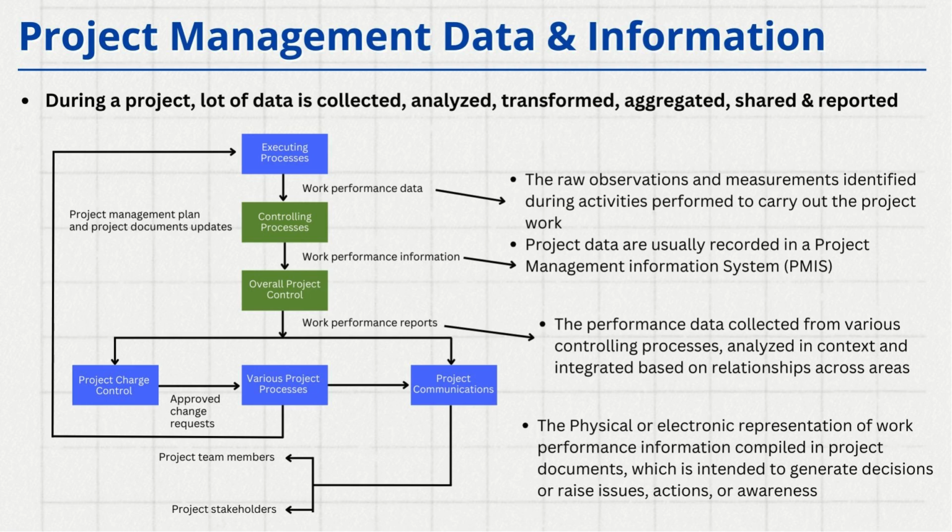How are we doing in terms of schedule? We also take into consideration the cost performance index and schedule performance index. So are we ahead of schedule or are we behind schedule? Are we overspending or are we underspending? Typically, all this information is analyzed based on the data that is gathered, and then we create different work performance reports. These reports are then shared with the team and with the stakeholders.